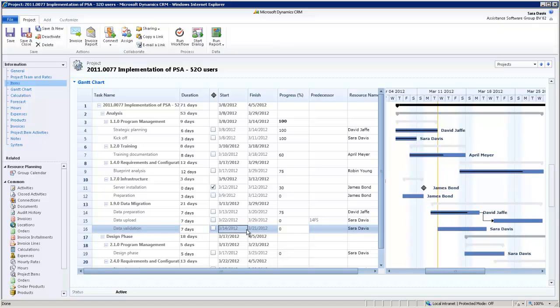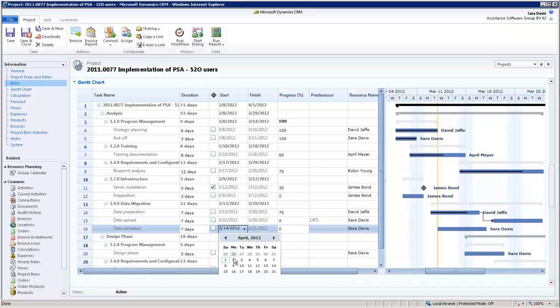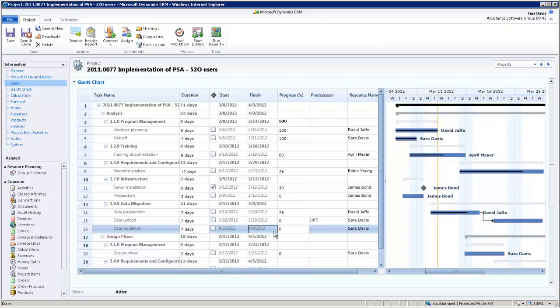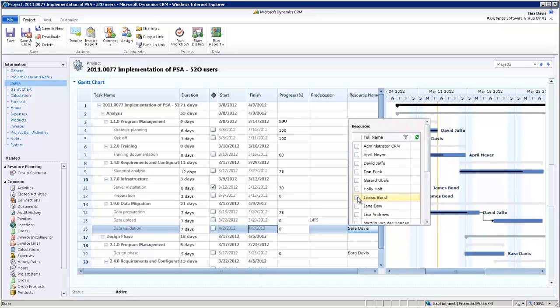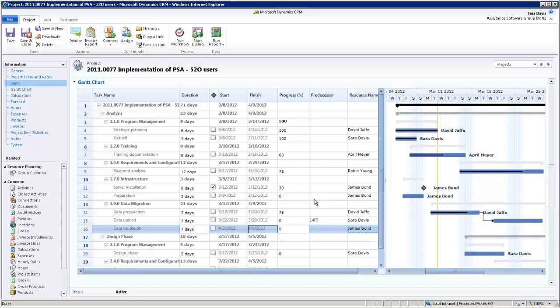Once you've defined your activity planning, you will be able to share it, either via a PDF file to post on a mutual SharePoint site for your clients, for example, or via an XML file that you could, should you want to, import into Microsoft Project.